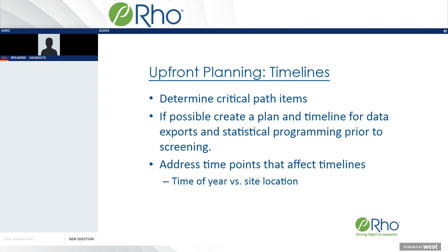So a couple things to consider in terms of your timelines. We're not just speaking to the milestones that you'll accomplish, but what time of year are you conducting your study? So one thing that can come up on acute pain studies is if you are planning a study that will span across daylight savings time, this obviously becomes very critical when you're talking about data being collected at specific time points. So there are oftentimes sites that will have patients stay over the weekend, and daylight savings time occurs on the early hours of Sunday morning.